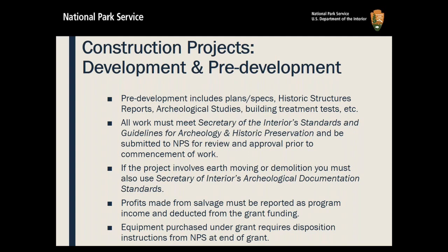So to start, construction projects we call in the government development projects. A development project for some of you is fundraising, but here we talk about development, that's a bricks and mortar project. So development and pre-development are the terms we use. Pre-development would include plans and specifications, historic structure reports, archaeological studies, and the like. For us, all work has to meet the Secretary of the Interior's standards and guidelines for archaeology and historic preservation.